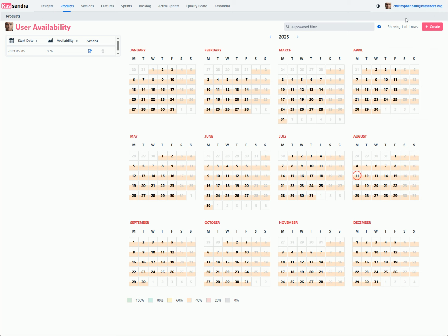Why do we need an availability history? Well, your capacity can change over time. You might switch to part-time work, take on management responsibilities that reduce your project time, or work overtime during critical project phases. Kassandra uses this information to accurately calculate team capacity, plan realistic sprints, and estimate project release dates.